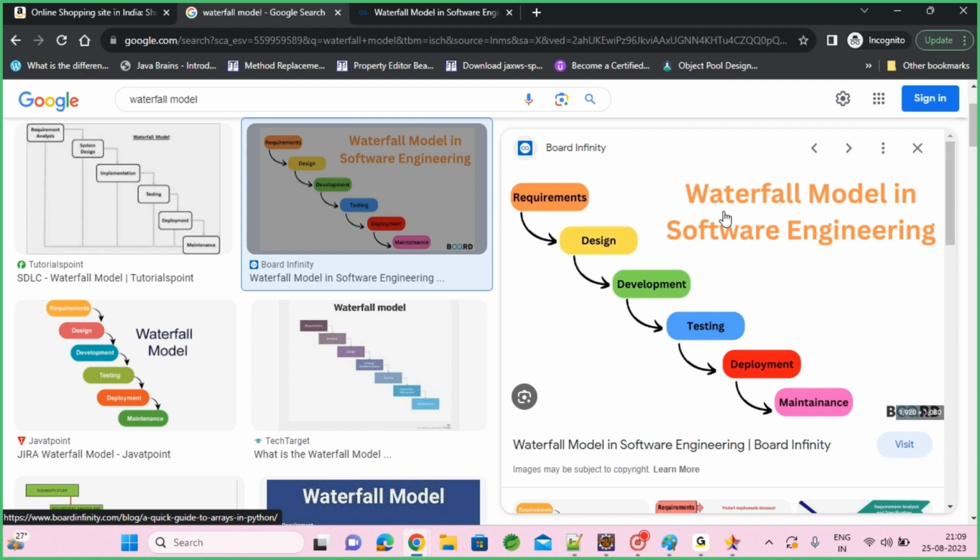Consider it is for a home construction. Now the foundation is done, right? You gave the complete requirement for 3 floors: I want to construct 2 bedrooms for each floor. This is the requirement you gave, and the builder started working on it. Now you thought, no, the first floor and second floor, I want to convert them into a duplex. I want to put steps inside. If you add those requirements and he doesn't agree because you chose the waterfall model, will you continue the contract with him? No, you will definitely ask him, no, do it, I need changes, because he only did the foundation.